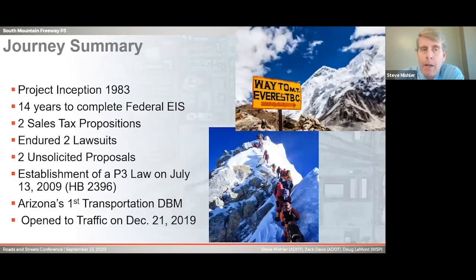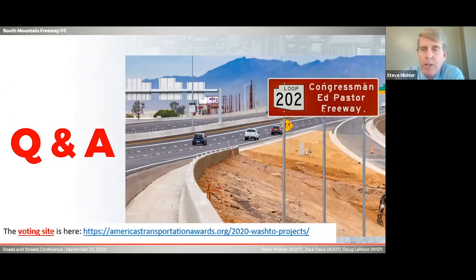Next slide. So a summary of our journey. The project inception began back in 1983. It took 14 years to complete the federal EIS. There were two sales taxes, Proposition 300 and 400. We successfully endured two lawsuits. We had two unsolicited proposals. The last one gave us the idea of doing one large design, build, maintain P3 project. The P3 law took place in July of 2009. This was Arizona's first transportation design, build, maintain, and we opened to traffic on December 21st, 2019. Next slide. Now we'll open it up for any questions you may have.